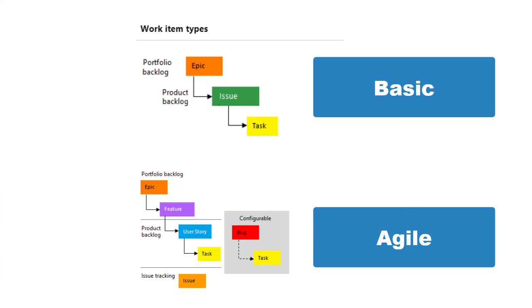Here you are seeing the hierarchy level of each process. First, let's have a look at basic. If you see, epic is at the top and issue and task are at the product backlog level. Similarly for agile, epic and feature are at the higher level whereas user story and task are at product backlog level. And it has bugs and issues as well in case if you have any issues associated with it to track.